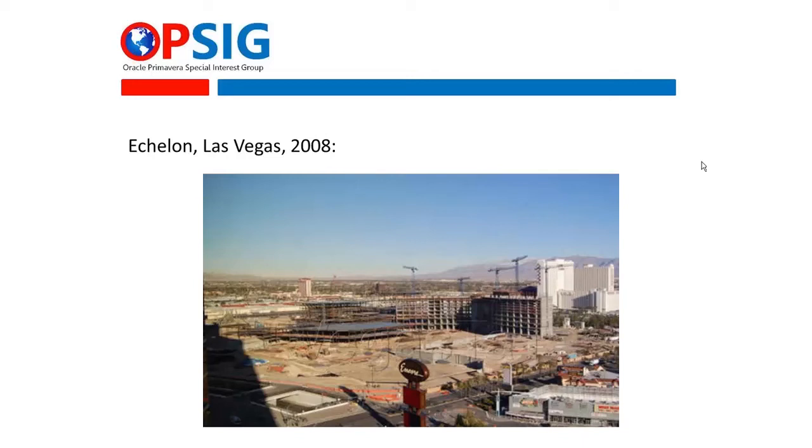What they had done to try to anticipate the problems is they had one scheduler who took site laydown drawings, marked them up using a Photoshop or similar package, put them into PDF, and essentially it created a PDF week by week for what the site was going to look like over the next 3 years. And of course, the only certain thing was that the site wouldn't look like that week by week. And the challenge of keeping up with what would the site look like, how would they get material to the site.